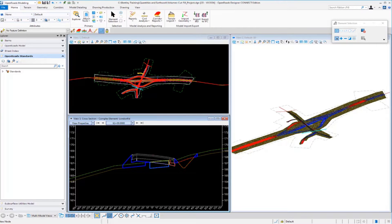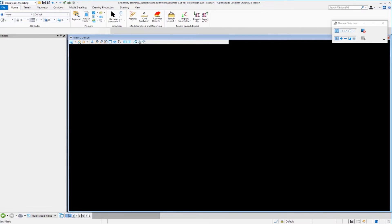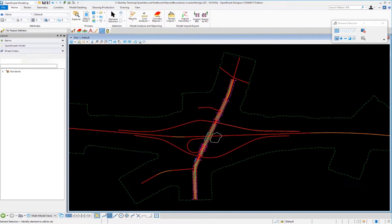In this video, we're going to look at how we can utilize named boundaries to create quantities separated out by station range, as well as how we can use these named boundaries for construction phasing and sequencing. We're going to create named boundaries at 100-foot intervals along our corridor, 200 feet to the left and 200 feet to the right, so that we can get quantities inside of each named boundary for reporting purposes.